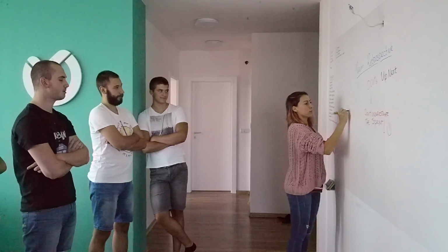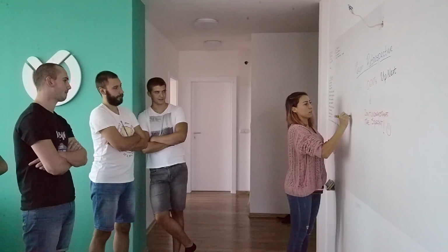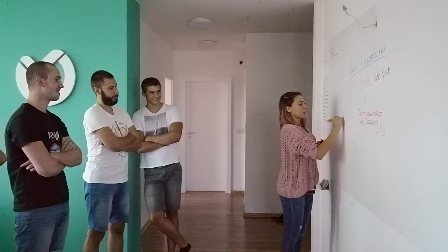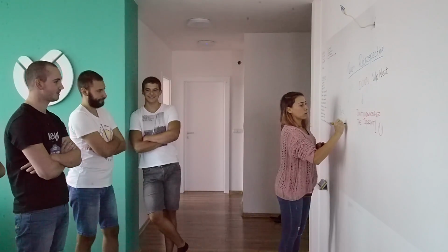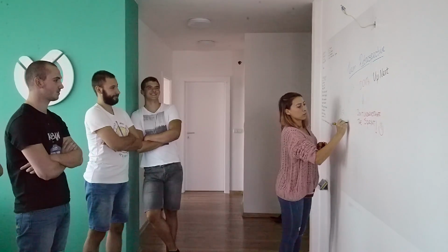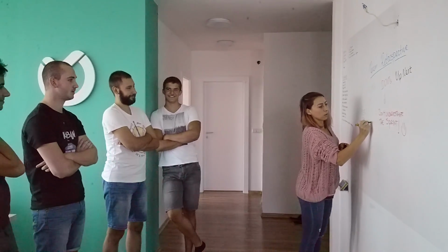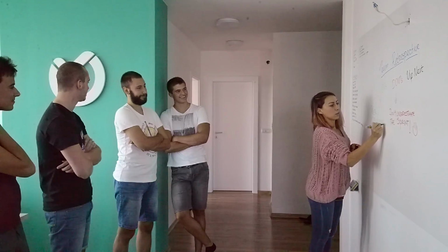For this meeting, the entire Scrum team should gather for a maximum of 3 hours. During this meeting, the team discusses what went well in the sprint, what could be improved, and what we will commit to improve for the next sprint. So this is it. You have finished. For next sprints, you can just repeat the steps and stay productive.